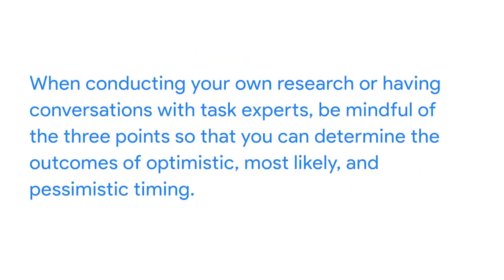When conducting your own research or having conversations with task experts, be mindful of the 3 points so that you can determine the outcomes of optimistic, most likely, and pessimistic timing. If someone quotes you a time estimate, don't just take their word for it without understanding the context they're estimating from. Think about it this way.